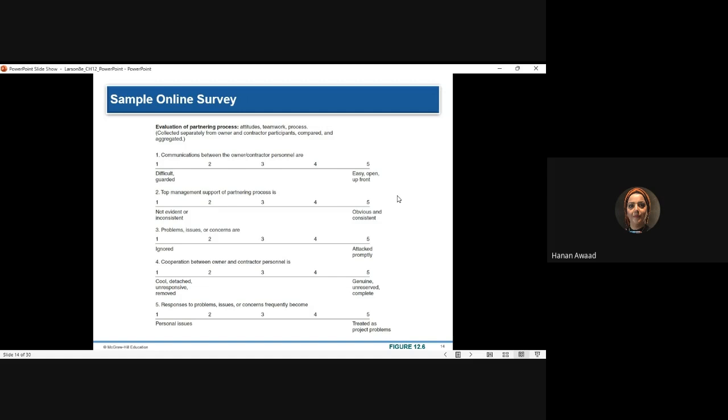We might create a service level agreement. So it means that when I send you an email, you reply, for example, within 72 hours, or 48 hours, or 24 hours, or something like this. We might have some quick review meetings to address any problems in the work, so we don't wait.